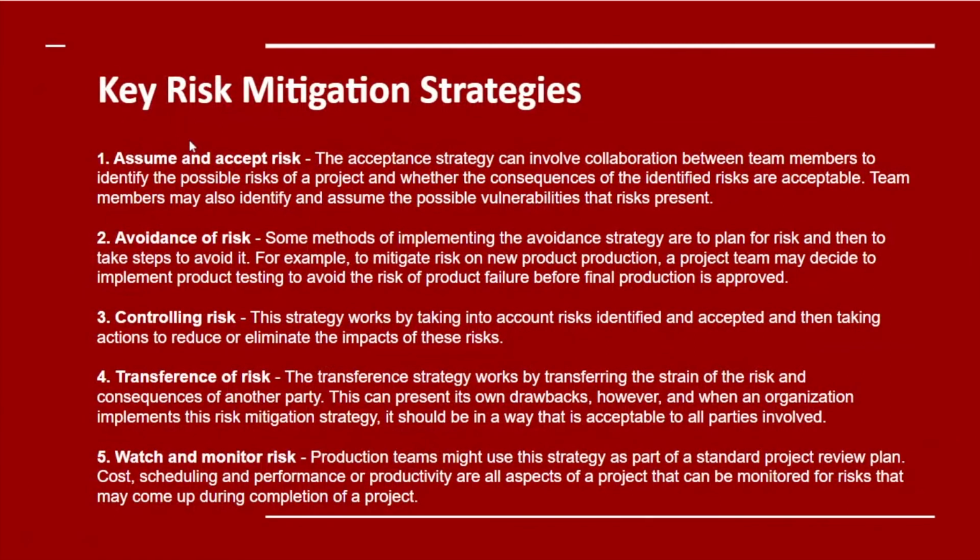So in terms of key strategies, we assume and accept the risk. In the ski hill business, that is something you have to do. We try to avoid the risk by, basically, clearing off trees. Don't have trees in the middle of the hill, that sort of thing would be an example. Controlling the risk: putting sandbags, or what do we call them? Hay bales around trees.